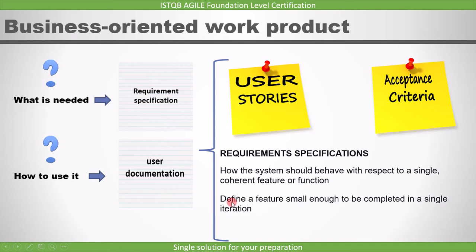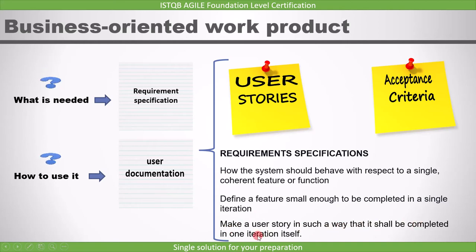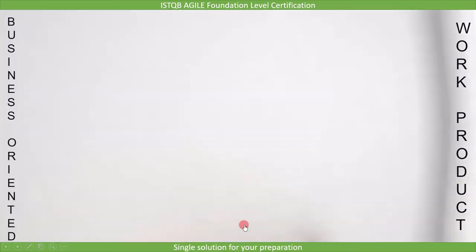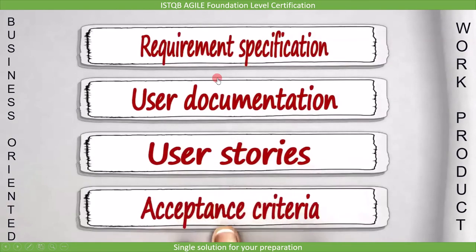User stories are the agile form of requirement specifications and explain how the system should behave with respect to a single coherent feature or function. A user story should define a feature small enough to be completed in a single iteration. What you need to remember is: requirement specification, user documentation, user stories, and acceptance criteria are the work products of a business task.